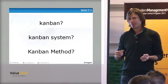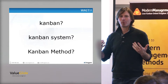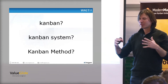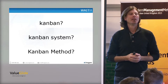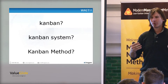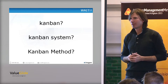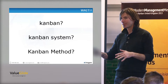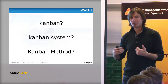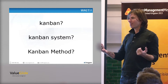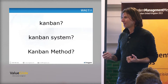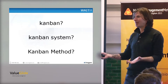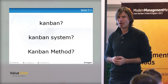A Kanban system — I like to say it's a pull-based work management technique. WIP limits are a tool that help you get to pull. A Kanban system uses Kanban to provide information about what's in flight, when do I have capacity to pull, and provide information to other people in the system to make better decisions about when to pull.